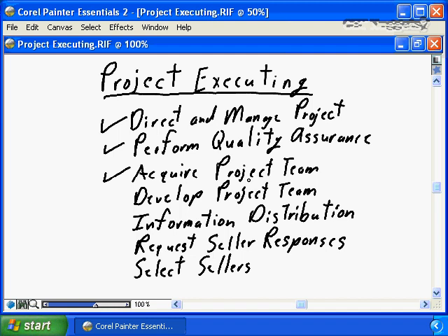the project at those points in time, and where appropriate, that resources are released from the team if after month 4 or month 6, 3 of the analysts are no longer required because you're heavily into development phase. It means that you are releasing those analysts back to the human resources team, relieving the project of them, i.e. relieving the project budget of the burden of those particular analysts who are no longer required.